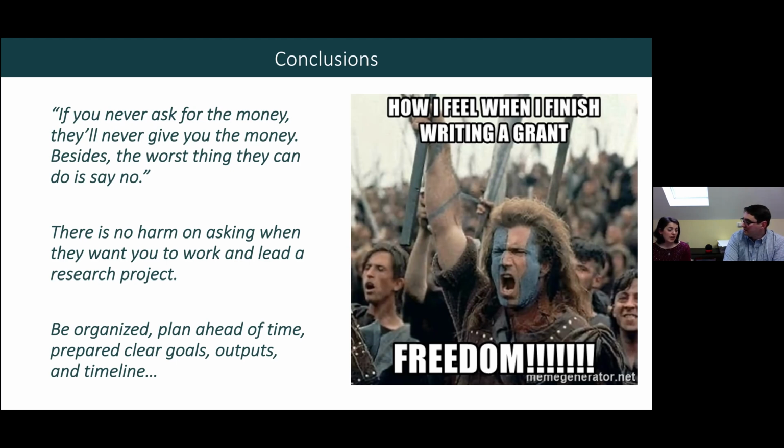I think also I may add there that if you have lots of co-PIs, you will have to require personnel documents for everybody, and you won't have them all together. They won't be responsive, and then you have them assigned in a role that they won't be able to meet, and you may not even be able to submit on time because you don't have their personal documents, like their resumes, there are many other conflict of interest documents and further notices that you might need. So also consider your partners very well when working.